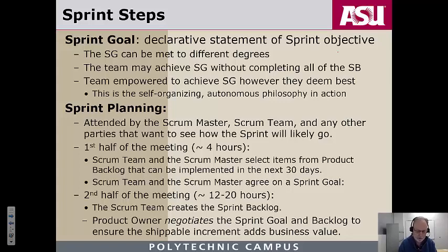Now, in kind of a pure world, the next ones that the Scrum team will do will simply be the next N number that they can get done in that amount of time according to how big the team is and how much work they can get done. However, they do have some flexibility in terms of selecting things from the product backlog, largely because the engineers should understand if there's some kind of natural synergies or even dependencies between some of the user stories that are on the product backlog. So you have a product backlog where